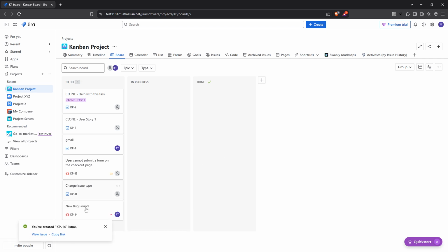After your bug is created, it enters the Jira bug status workflow. This workflow typically starts with the status To Do. As work progresses, team members will transition the bug through stages like In Progress, In Review, Fixed and ultimately Closed. Each transition represents an action or a decision taken by the team.